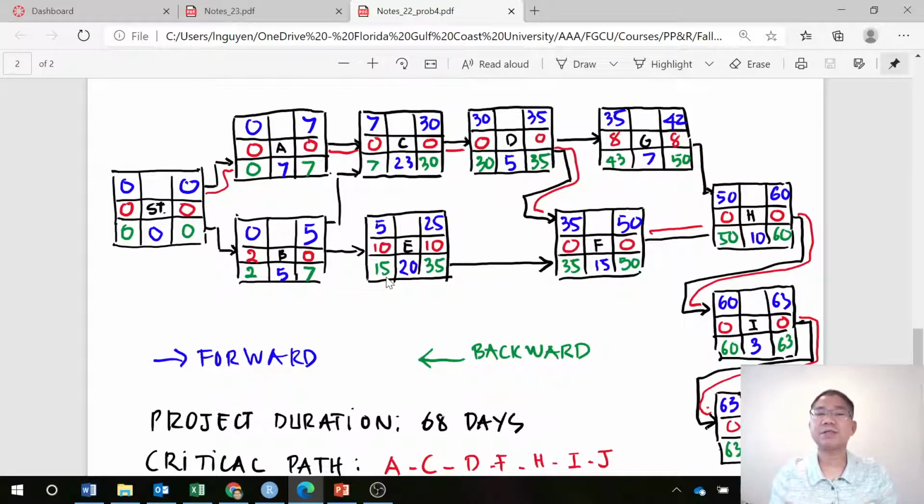There are risks in delaying the start, just like when you submit a class assignment. If you delay until the last day before the due date to review and prepare the assignment, there is a risk that you cannot finish on time, or the quality of your work can be compromised. Same for managing a project. If you start as early as possible, you have some buffer to manipulate to ensure the project is on time. If you start as late as possible, most likely there are more risks.